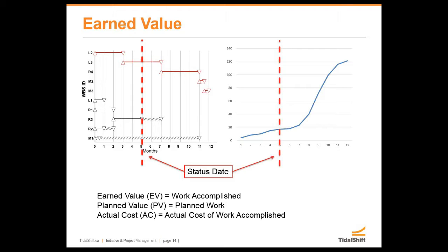I know I've done this, guilty as charged. I've run projects where I had a single number budget. I had a single number that was, okay, this project's going to run 50,000. And meanwhile, I didn't have the flow of money over time. So I didn't have a baseline. So basically, you run the project, and at the very end, you go, oh, did we meet it or not? So we had no way of knowing at the 5% or 10% or 20% or any percentage point through the project where we're at.